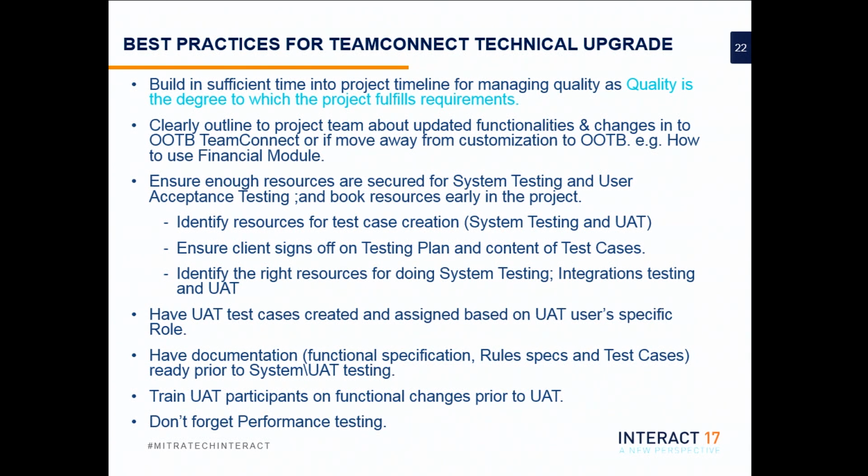It doesn't matter if TeamConnect itself is functioning, you can't go live without integrations functioning. Another thing that I'd like to highlight is that it's important to put together the user acceptance testing scenarios based on roles. You don't want to waste the time of an IP attorney testing budget functionality. He's going to ask a bunch of questions, he's going to be frustrated, and it's not going to help anybody. It doesn't help the project. So please make sure that when user acceptance testing scenarios are put in place, they are customized to whoever's testing, to their roles.